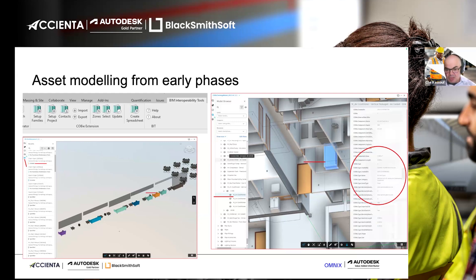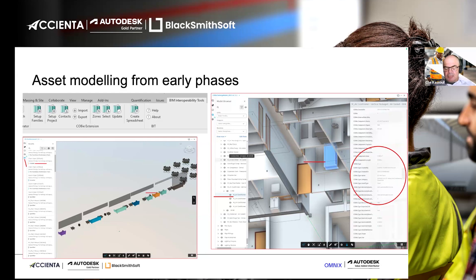For facility management compliance, using a specific extension adds all required attributes to your model. Once uploaded to the ACC cloud, these are available in the Asset Module. The Asset Module leverages all this attribute information — you can change the color, see the status, follow up on purchasing, track warranty expiry dates, and more. All of this can be viewed once you have the information properly populated.